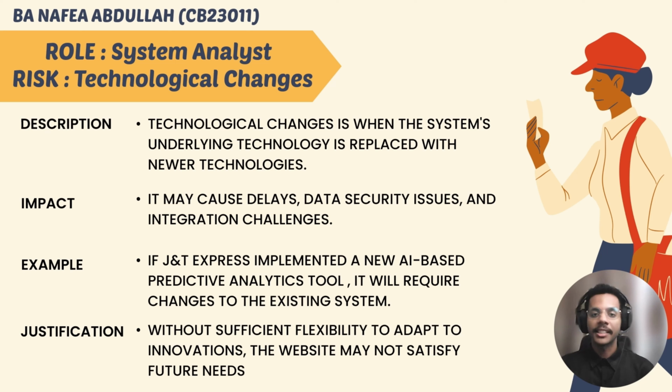One of the potential risks to the project development of the GNT Express system is technological changes, which is replacing the technology of the system with new ones. An impact of technological changes is that it may require additional training, system updates, or even a complete redesign of the GNT Express system, potentially causing delays, integration challenges, data security risks, and disruptions to the website functionality, impacting customer satisfaction and business operations.